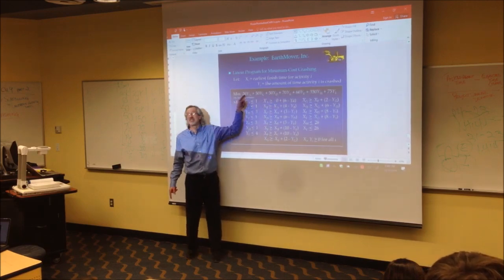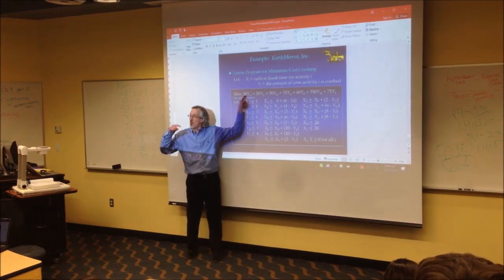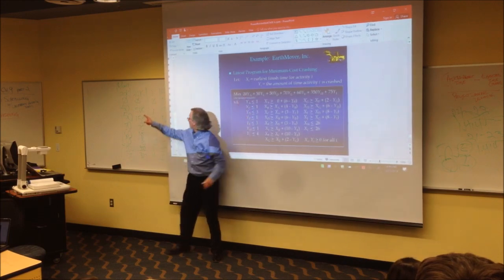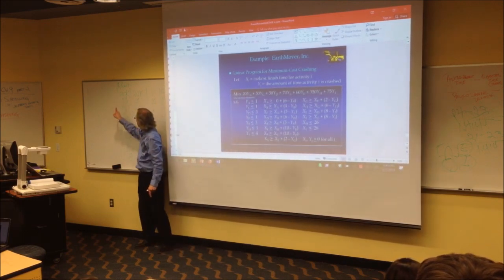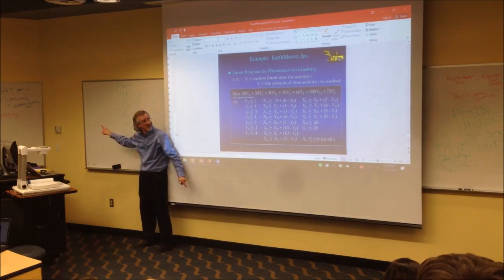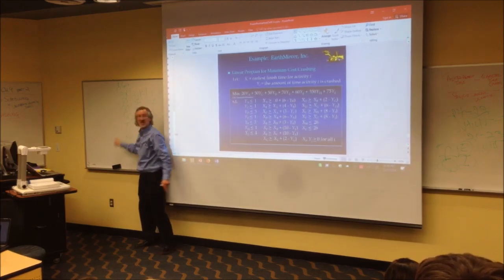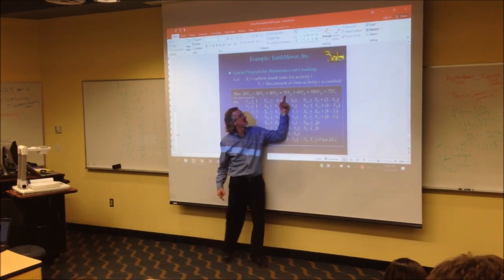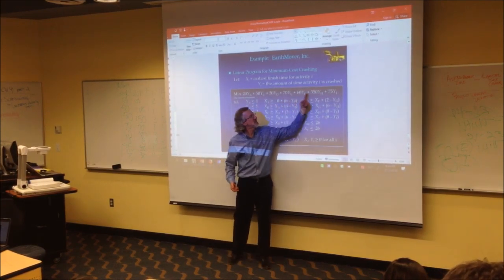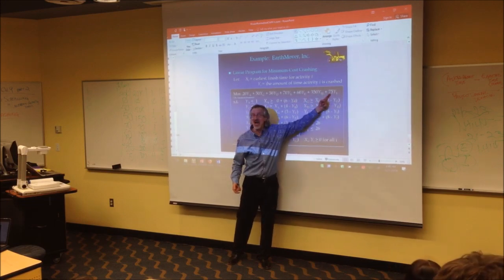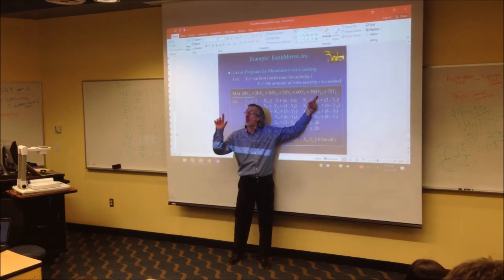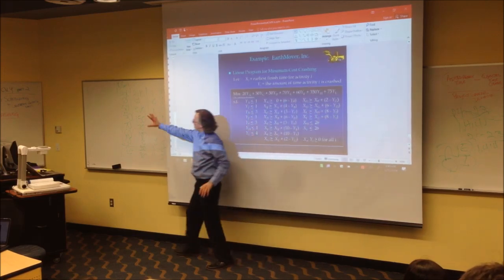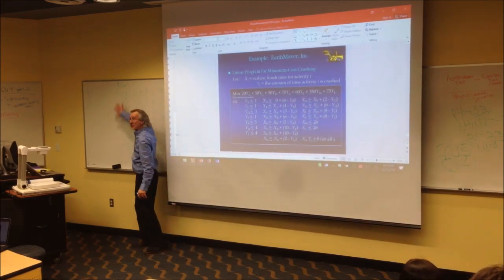Y sub A times the amount it will cost per 1 unit of time of crashing. So that this column, there should be a 20, a 50 with C. Is that true? A 50 with D, a 70 with E. 20, 50, 50, 70. These are in thousands. 60, 350, 75. With the variable Y, sub whatever activity represents. You did this work right here to write your objective function.